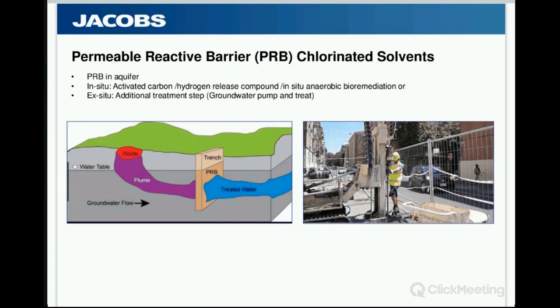Which is going to be a mixture of activated carbon and hydrogen release compounds to enhance bioremediation. However, a lot of these processes, these barriers, only last for about 4 or 5 years, and they need to be replenished, which makes the cost of them quite expensive.